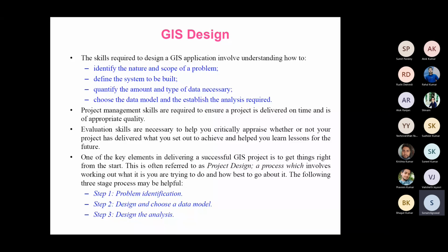So in any project design, we have to go through this very first step, requirement analysis as well as feasibility analysis. Many times our expectations are not even feasible, so instead of putting all our effort into that, we first have to perform the feasibility analysis. When it has successfully passed the feasibility analysis, the next step is requirement specification. Requirement specification is a long step. It needs to be done very correctly because any mistake at this stage will finally affect the output.